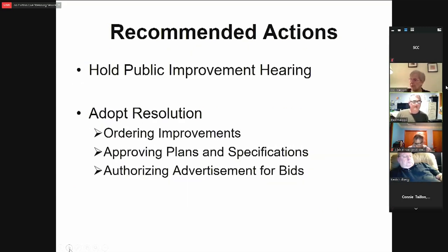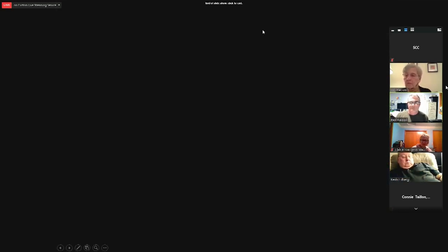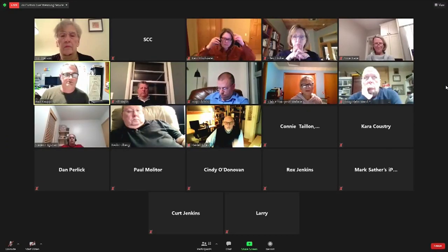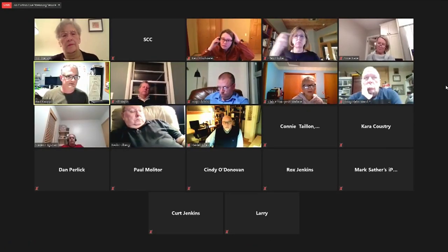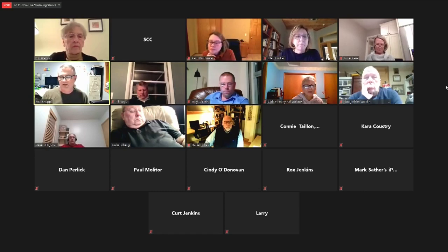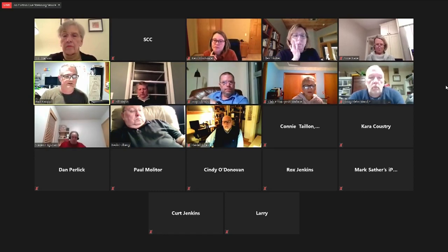So the recommended actions tonight would be to hold the public improvement hearing and hear any public input on the project. And if Council so chooses to move forward, they would approve the resolution ordering the improvements, approving the plans and specifications, and authorizing staff to go out for bids. This process is required by Chapter 429 of the state statute, so we're following a very specific process. With that, I would be happy to answer any questions Council might have.